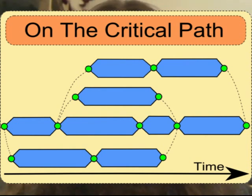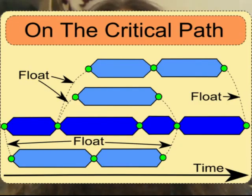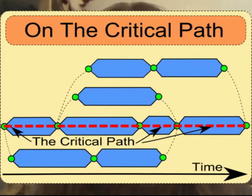Task dependencies are not shown. Looking at such a diagram, it can be seen that some tasks are not time-critical — their start time can be varied without impacting the delivery date. These tasks are described as having a float, a reference to the total time available on either side of them. However, other tasks are time-critical: any delay in their completion results in a delay in the project's final delivery date. These tasks form a continuous path with no gaps, directly from the start of the project to its completion point. Usually there is only one such path, and all the time-critical tasks lie along it. This path is known as the critical path, and it can be seen in this diagram.